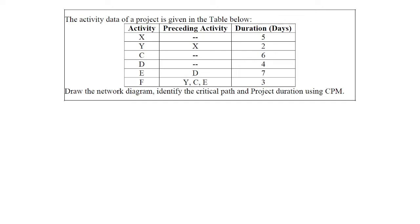Let us see the first numerical. The first numerical question: the activity data of a project is given in the table below, with columns for Activity, Preceding Activities, and Duration in Days. We are asked to draw the network diagram, identify the critical path, and find the total project duration using the critical path method. Activity X has 5 days duration. Activity Y is preceded by X with a duration of 2 days. Activity C has 6 days, Activity D has 4 days, Activity E has 7 days with D as its preceding activity. Finally, Activity F has preceding activities Y, C, and E, with a duration of 3 days.